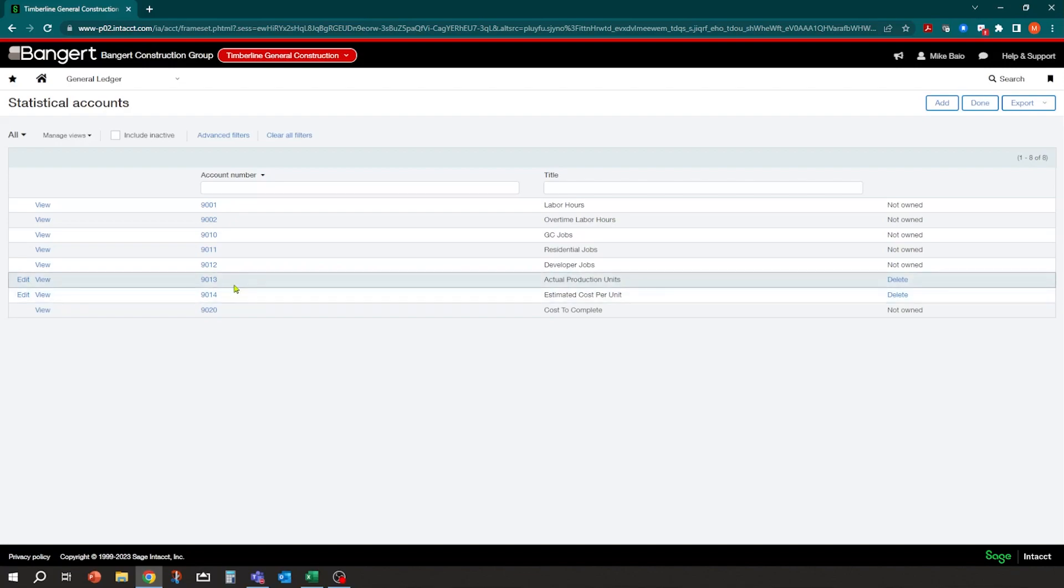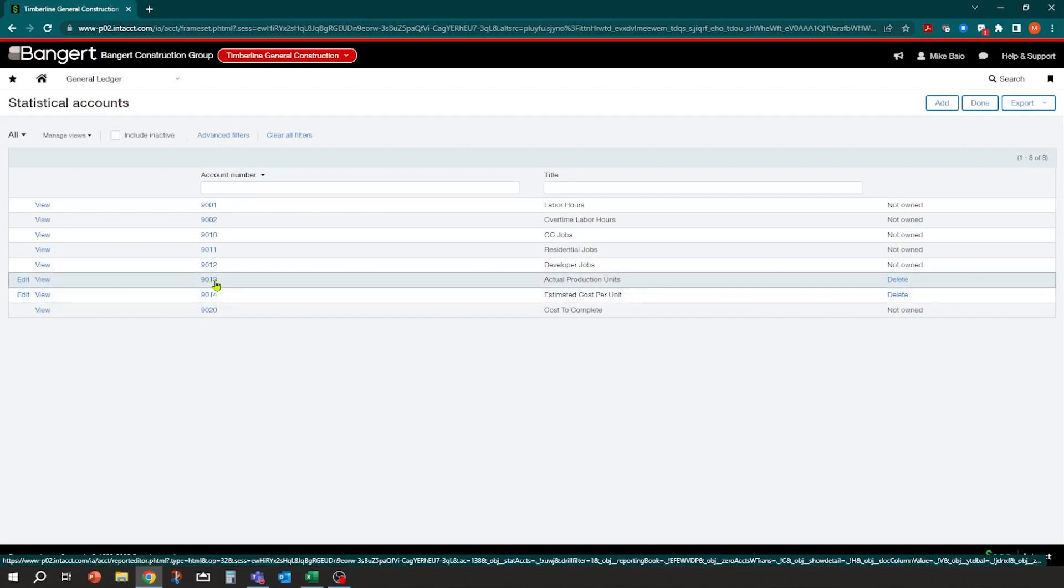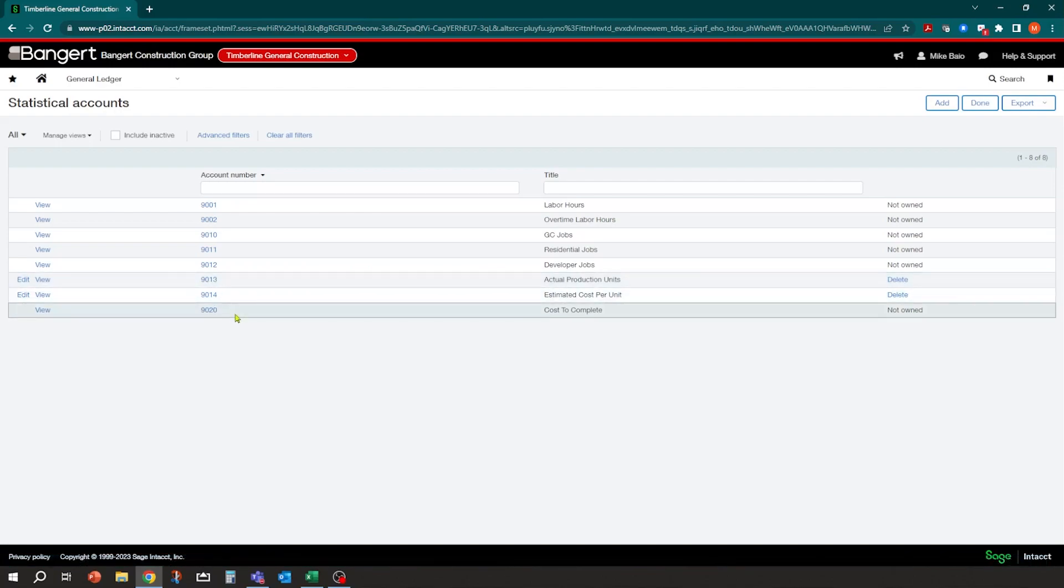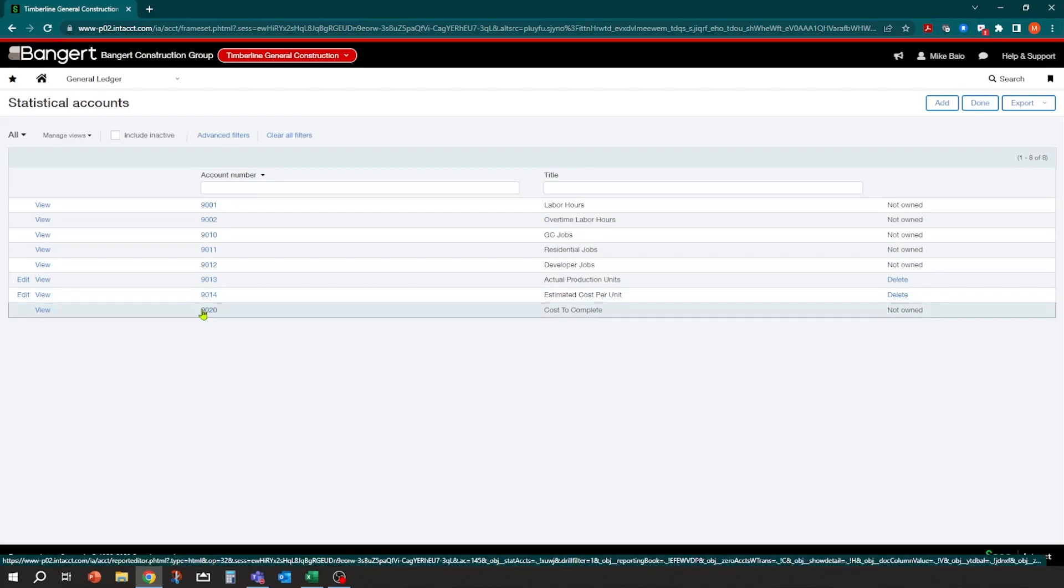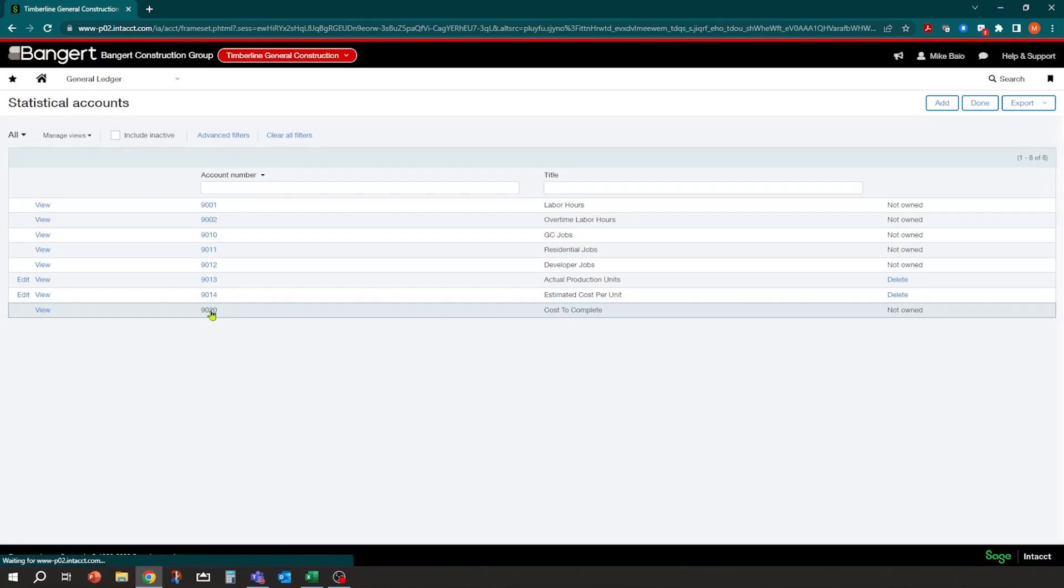Some people would rather use an alpha type of coding. So for example, in this scenario, we're going to talk about cost-to-complete. We're going to have a PM go in and actually say, okay, we're going to put in what we think is remaining cost-wise comparative to our budget and our actual costs in the project. Another method could be cost-to-complete percentage, and then you could do a calculation. You may want to label this account number as CTC, cost-to-complete or something like that. But basically, it's pretty straightforward setting one up.